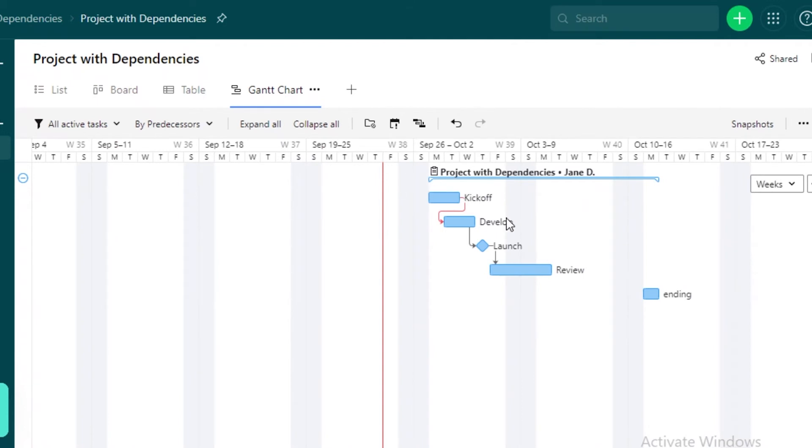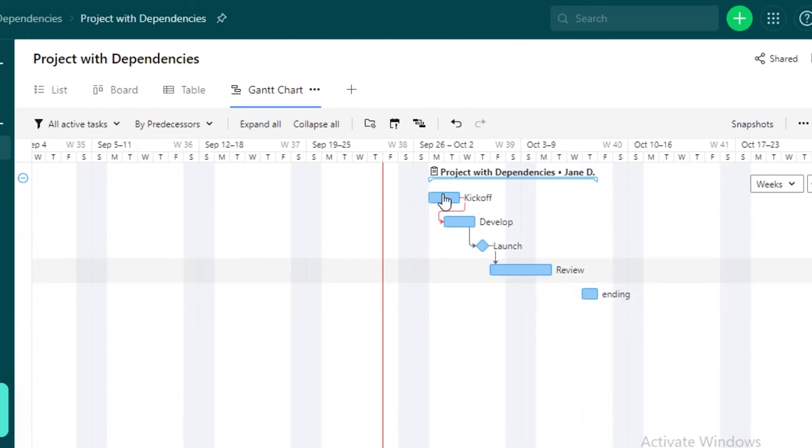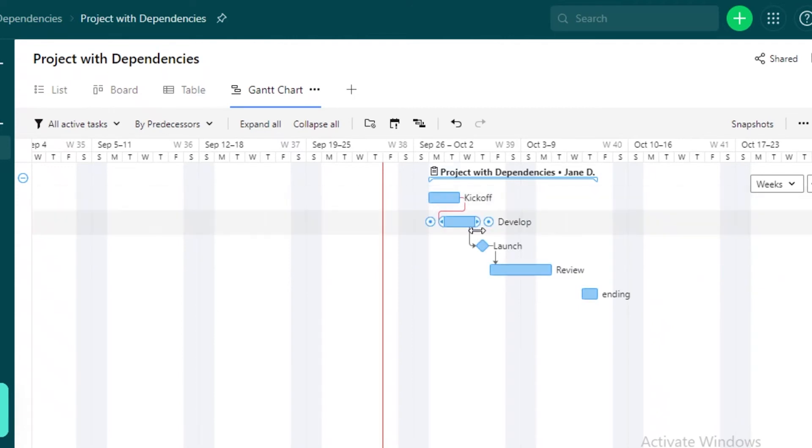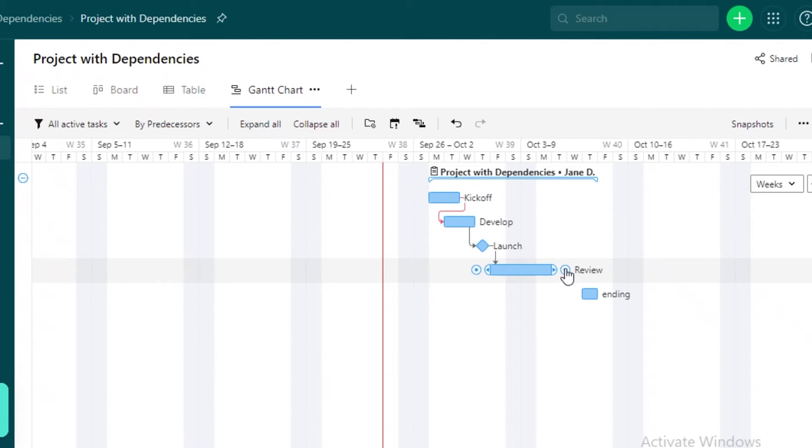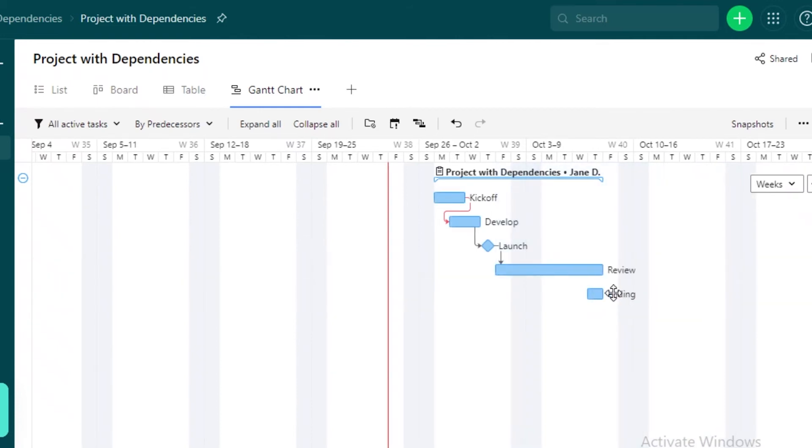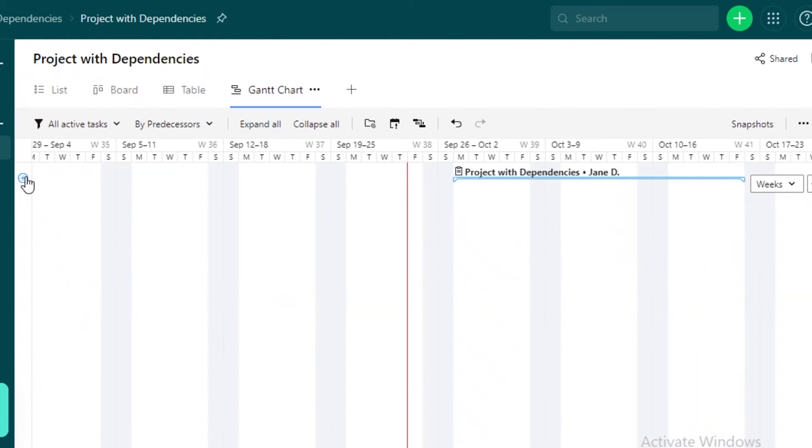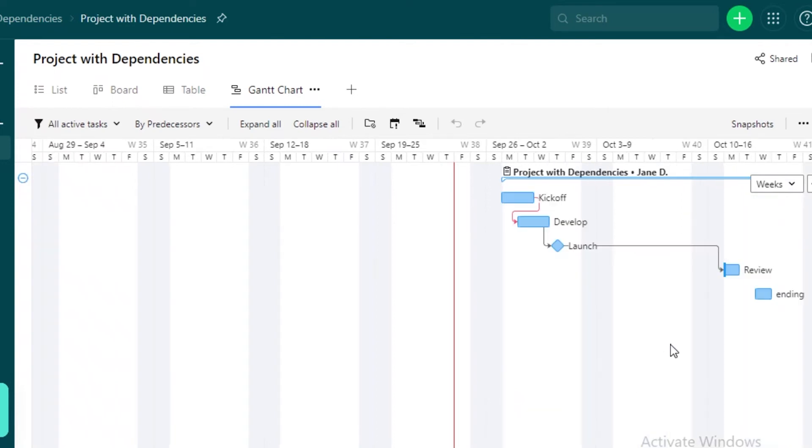And now you can view all of the projects or all of the tasks that are happening and you can get a good view of everything. Another thing that is very good about this is in terms of dependencies. You can see when the kickoff happens, then you have an arrow that leads to the development and you can add these by clicking on these dots. You can expand the time for any of the projects as well. So if the review is taking long, you can extend it and then you can move the ending like so without having to write down the dates.